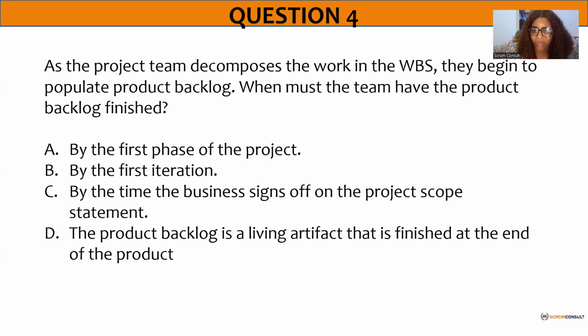Wow. Let's look at a project for a government, a heavily regulated business environment. Maybe one minister was not on seat for God knows how long, and you go around for that change. So this is rigid, and that's why they do a predictive plan. They want to sit down and really do a thorough plan. Some projects can take 1 year to plan. It can take 6 months to just plan, only plan, because once those approvals have been done, it's rigid.